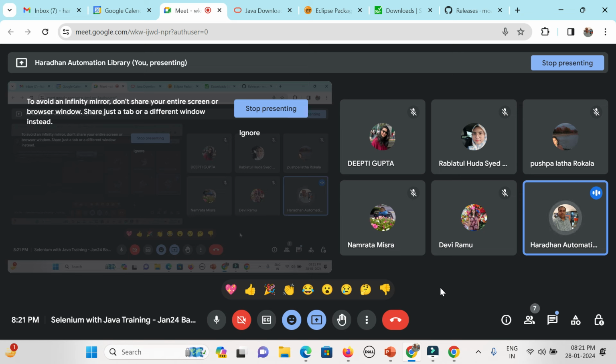Otherwise, in the generic case, suppose you have a total of 20 sprints, maybe a one-year journey. Nowadays, automation from the initial time, the team can automate something, and that can be beneficial for the next sprint as well. But in real-time practice, in case it's a big project, it is better that the automation team joins after a couple of sprints are over, so that at least the basic requirements will be stable. Because the automation team also takes time; it cannot automate things on day one itself. It might take a two, three or four month journey.